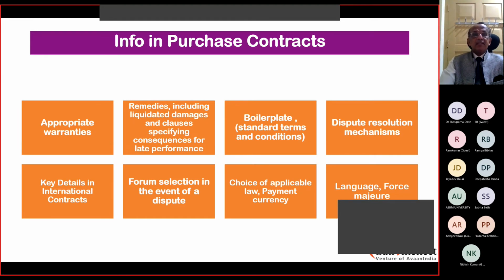In a turnkey project, there is a main contractor and many subcontractors. Only the main contractor is subject to such penalties. Other contractors are not bound by any such delay clauses, because you are an intermediary. You're bringing goods by air freight or sea freight, and things can go wrong. It's not under your control.